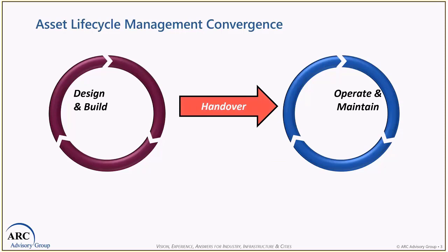Now, just focusing in on the handover process for a few moments, in the past, or maybe currently in your particular operation, the design and build process occurs. Maybe you've engaged with an EPC, and at the end of that design and build, there's this handover process where all the documents related to the asset are given to the people who will operate and maintain the asset.